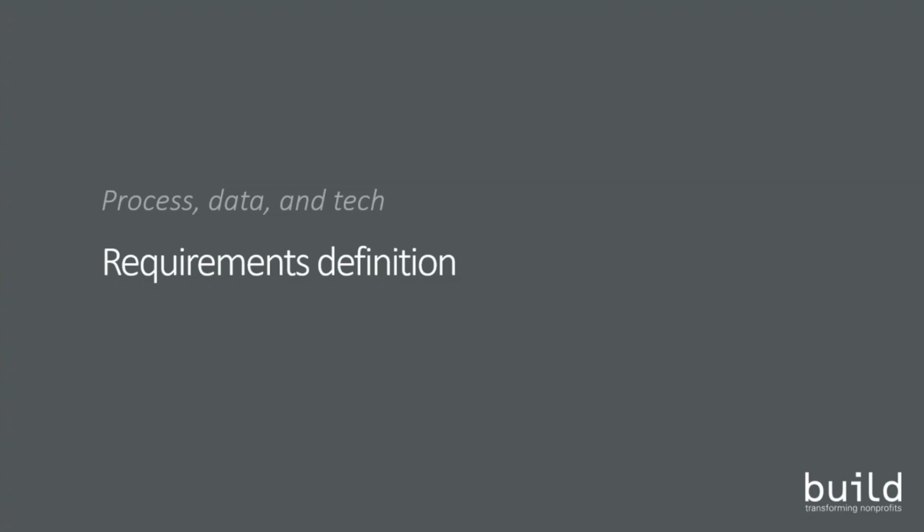If the organization has a poor understanding of its current business processes and data, or processes are performed inconsistently, or data quality has been poorly managed, then thorough business requirements can be very difficult to develop. And that has a direct impact on the technology that's selected, whether the technology that's selected is appropriate for your organization. And then once selected, poor business requirements are one of the leading contributors to projects running over budget and